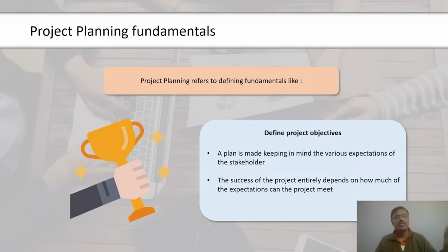All the activities are assumed to be on the critical path here. By crashing, if you end up saving time on the path, which is not the critical path, you will not end up saving time on the project. In the next screen, let's look into the impact of schedule compression.